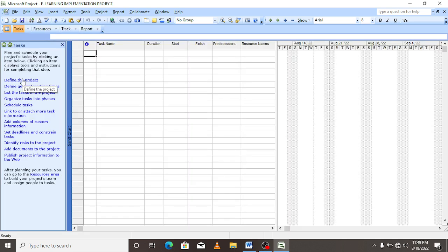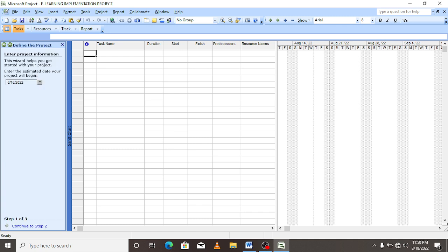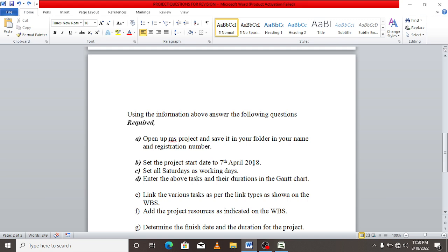These are interviews. You attempt, define the project. My first interview: enter the estimated date your project will begin. So that will be the start date. You can schedule your project either on the start date or at the end date. But in this question, they said set the project start date to 7th April 2018.